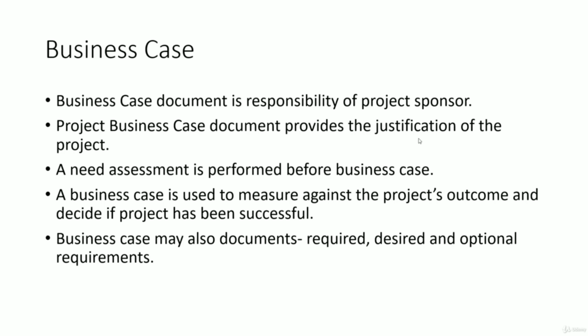And as the last point suggests, we may have the options of required, desired, and optional. This is a good option when you are not sure about the budget and the time frame. It's like must have, could have, these kinds of requirements which help in prioritization. At a later stage, when you have the project and the requirements and details are far better than they were initially, you can plan and see if there are any additional functionalities which could be targeted based on the resources we have now.